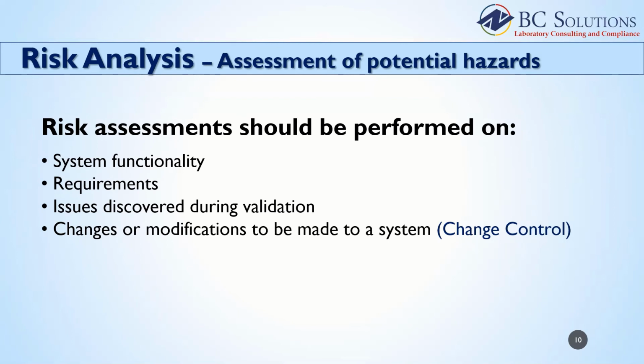You want to assess what functions may be affected by that change and determine the risk if that change is not implemented correctly. Software bug fixes, patches, and service packs can get a little more complicated. You will want to analyze the information provided by the software vendor and perform a risk assessment on how those installations may affect the functions in use at your facility. You should determine how even moderate and low-risk functions will be affected.